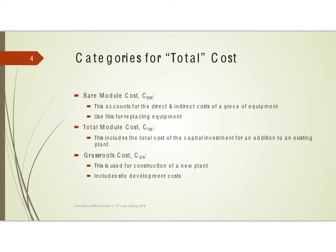We've discussed this in a previous lesson, but let's review. There are some categories we use for talking about what the total cost is going to be. A bare module cost simply means you're going to buy the equipment and install it without a lot of extra engineering fees or extra utilities — that's the bare module cost, and it's basically used when you're simply replacing equipment. A total module cost is a more substantial addition to a facility, but you are at an existing plant so you have all of the infrastructure you need, though you may need to put in additional pipe racks and things like that.